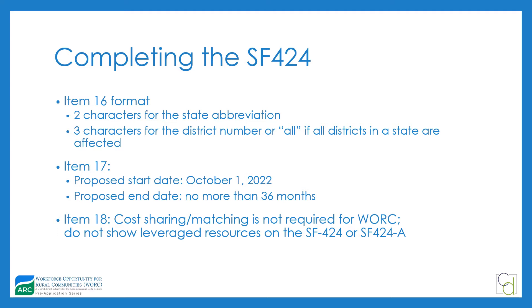For item 17, your proposed start date is October 1, 2022. Your proposed end date is no more than 36 months — so September 30, 2025. Every grantee awarded so far has gone the full 36 months. You can technically do fewer, but if you do, our recommendation is to end on a quarter-end date. If you go even one day into the next quarter, you have to report on that entire quarter, so you might as well implement for the full quarter.